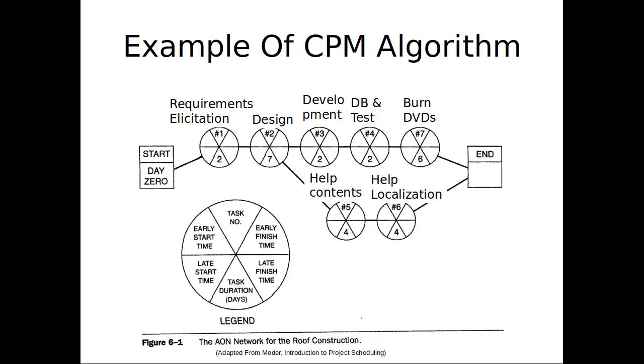Yeah, the early start and early finish. Okay, now I further noted that really in this form of it, you only have to worry about deriving early start, because early finish is just early start plus what? Duration. That's not always the case. For precedence diagram method where you have start to start dependencies or start to finish or what have you, it actually gets rather more complex with that. But for this case, it's quite simple. So really we have to focus on the early start.